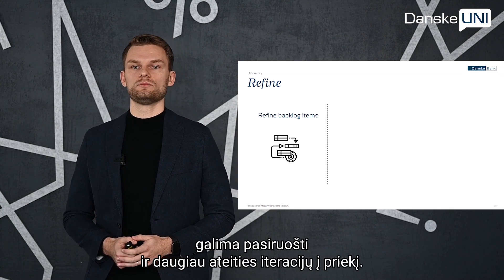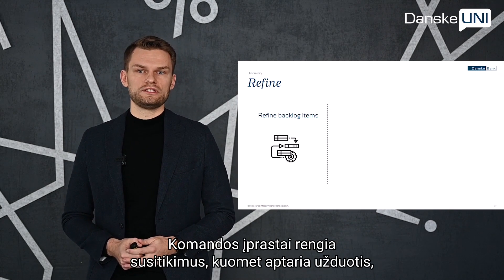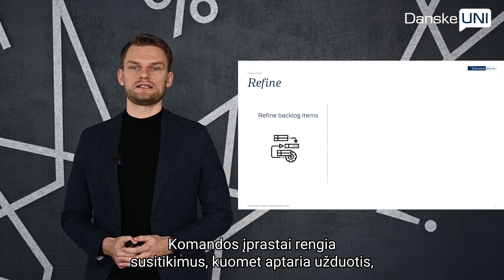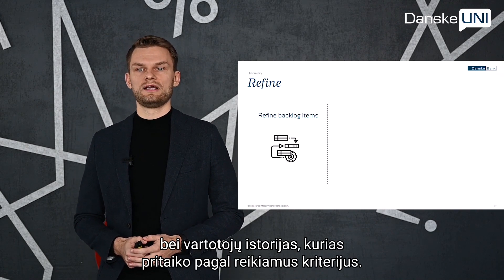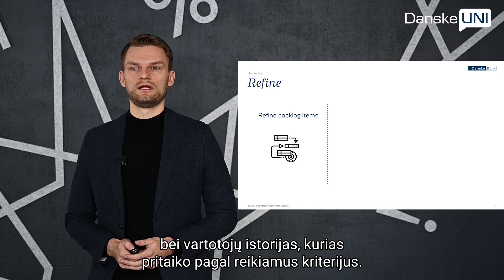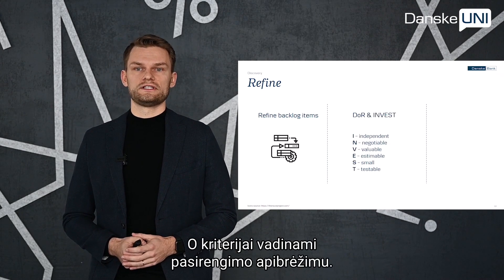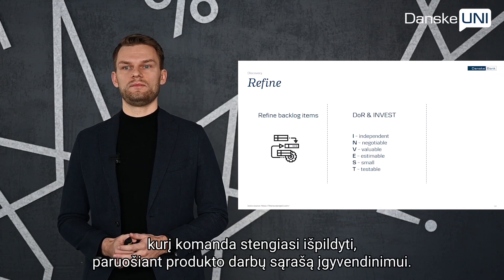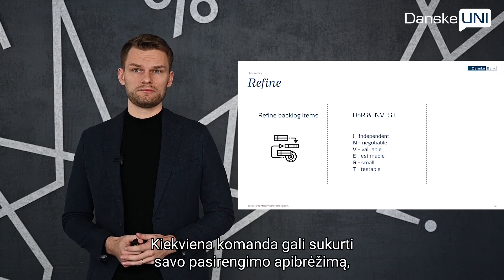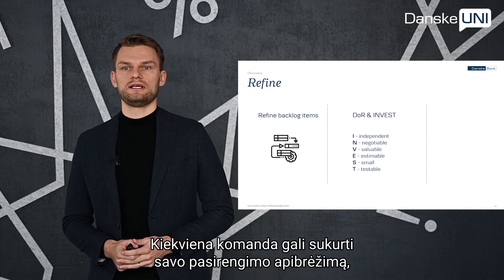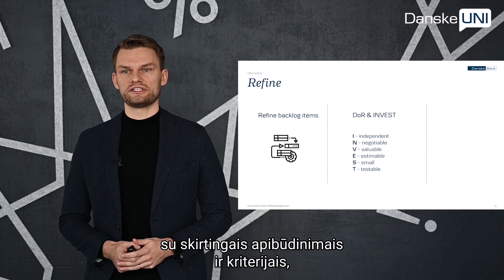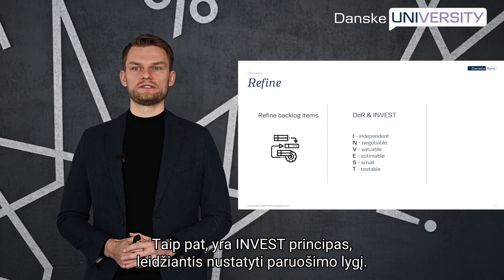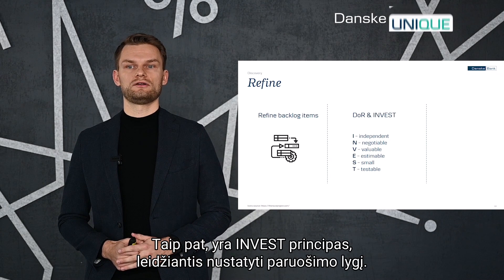If we have a compliance, regulatory, or any other initiative where everything is more or less clear, we can prepare backlog items for even more iterations in advance. Usually teams have a backlog refinement meeting during which team members discuss tasks and user stories and refine them so that they meet a set of criteria needed for implementation. This criteria is called definition of ready — basically a checklist of agreed points the team aims to fulfill in order to have backlog items ready for development. Each team can come up with its own definition of ready that can include different descriptions, acceptance criteria, and other agreed points. Additionally, there is the INVEST principle, which helps to align understanding of when backlog items are well prepared.